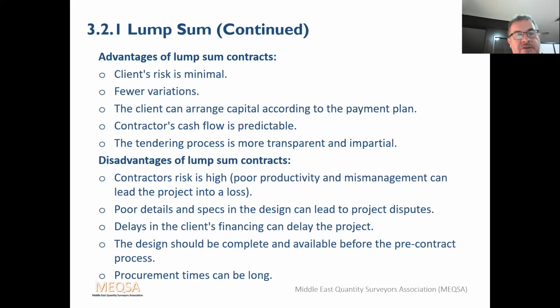Advantages of lump sum contracts. Client's risk is minimal. Still risk, but minimal. Fewer variations. The client can arrange capital according to the payment plan. The contractor's cash flow is predictable, and the tendering process is transparent and impartial.